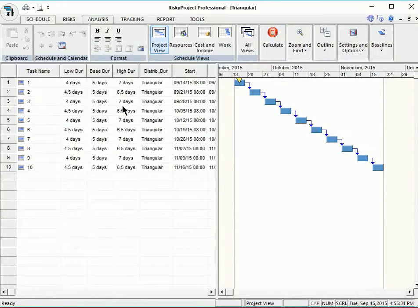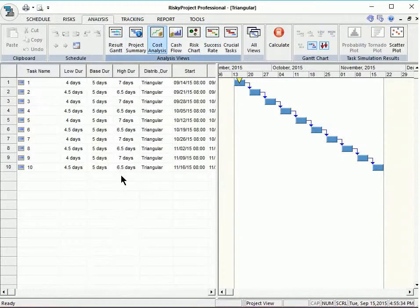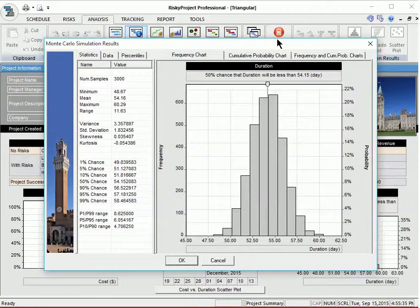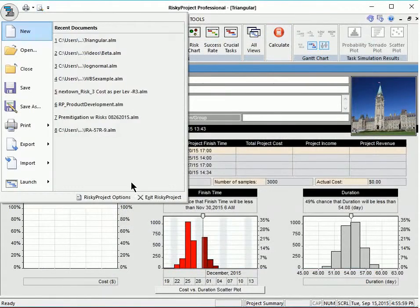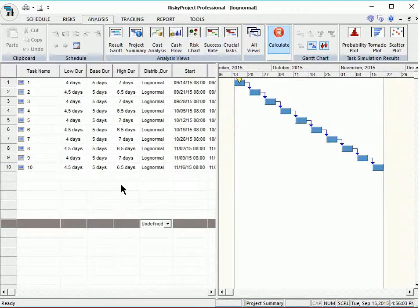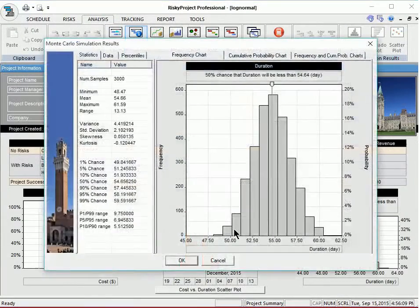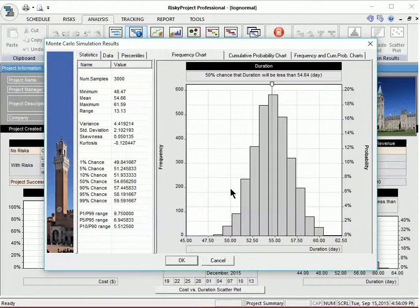If we run a simulation and take a look at the analysis, we can look at the project results. For the triangular distribution, the mean is 54.16, the P10 is about 52, and the high is about 56. Now if we go to the log normal and run a calculation, looking at the project summary, we can see that the mean is about 54, the low is 51, and the high is 57.